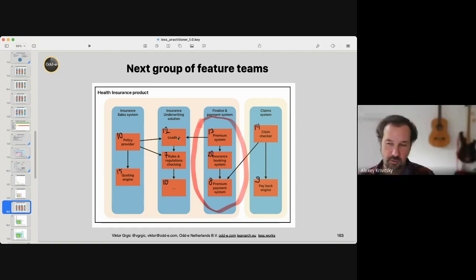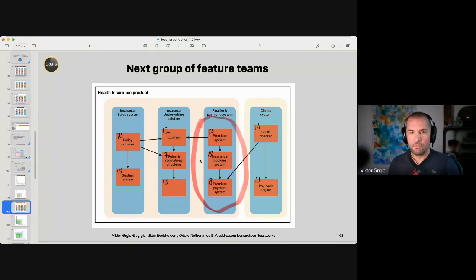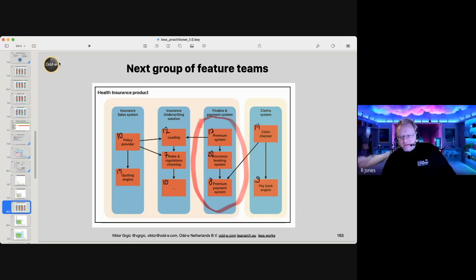Based on your experience with LeSS Huge, Victor, right? Yes. It's not a rule or an axiom. To be really clear, that's how you saw LeSS Huge being done. No, there is also a rule. A rule says do not restructure teams. Do not change team structures. Teams are stable. Okay. But once you've done it, you mean? Once you've done it, don't keep redoing it.